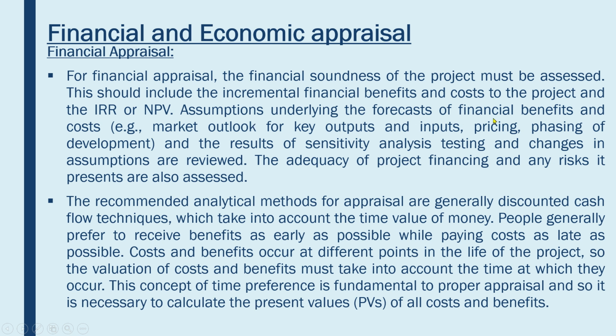Assumptions underlying the forecast of financial benefits and cost, for example, market outlook for key outputs and inputs, pricing, and lastly, phasing of development. And the results of sensitivity analysis, testing changes, which we will study, inshallah, in phase two of this. Changes in assumptions are reviewed. The adequacy of project financing and any risks it presents are also assessed.